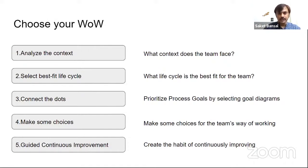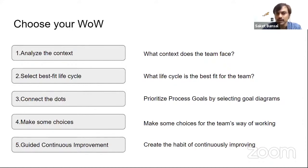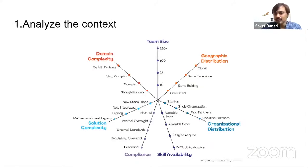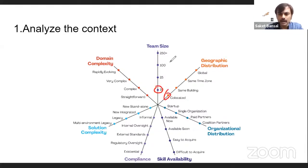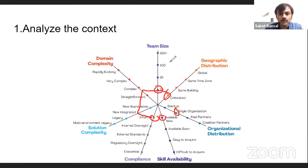So those are the five-step processes. Analyze the context — they have a kind of context identification framework, which they call a scaling factor identification tool. You sit with your team and understand where you stand. For example, team one might say: we have 10 people, we are co-located, single organization, we have all the skills needed to get the job done, we're not in a complicated compliance environment, and our application integrates with something but the domain is somewhere between complex and straightforward.